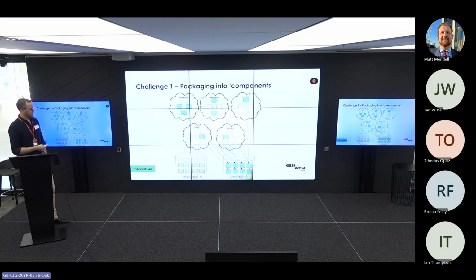So the challenge we have here is that, one, we need to be able to put these things into packages that we can then tender and contract and hand across for a contractor to do. And secondly, we need to make sure that we haven't missed anything, right? There isn't a bit of requirements or a bit of scope somewhere that isn't sitting in a package, that everything is remitted. Otherwise, we'll get into a position whereby package A delivers and package B delivers and package C delivers, and yet we still can't run a railway because we've forgotten something. So there's a piece missing.